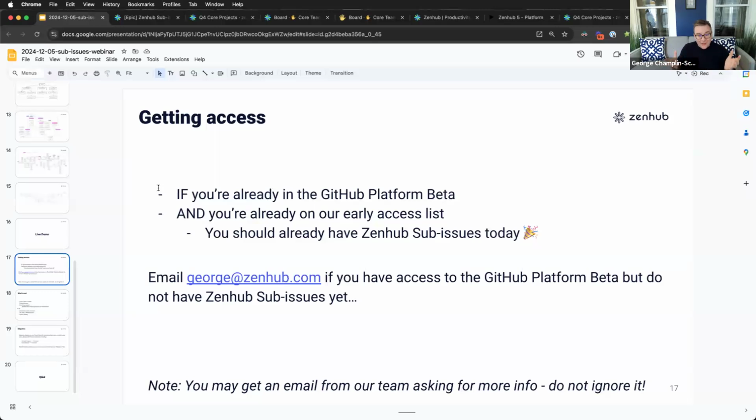The thing I'm really looking forward to now is the fact that because these are just issues moving forward, and issues can be moved between repositories, I can have one repo that I use for draft roadmap planning. And when I'm ready to go, yes or no, I can just move that into the globally shared one, and then it's automatically updated. So I can build a roadmap in private using issues in my own space. And then when I'm ready to, I just move it to the global repository, and everybody sees it.